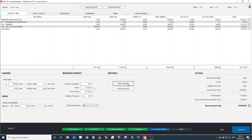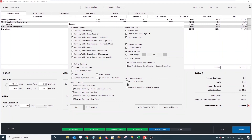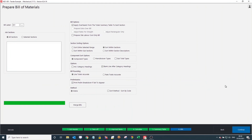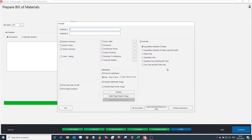Now I'm going to come over here to Select Reports. These reports give you any breakdown of the job that you need — if you want to know how the job arrived at its cost, giving you the complete material breakdown as well as labour and all of the markup. If you'd like a material quotation to send to your wholesaler, that would be the Material Summary Unpriced. All of these reports are internally for yourself — they are not for your client. The ones for your client, the final printouts, are on the last stage: Bills.